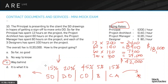The key takeaways: you need to know the SD-through-CA percentage breakdowns and understand the concept of billable hours — you don't just make up a number; you estimate how many hours each phase should take and then meet those hours. This project has already burned through far more than the SD allocation, leaving very little fee for DD and CDs. They will likely lose money.